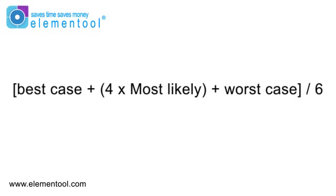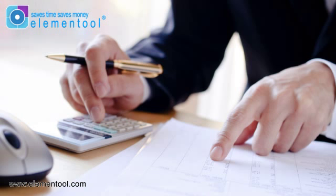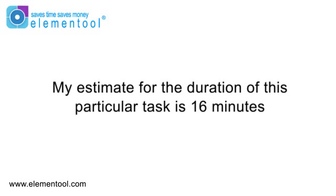Now I take the formula, which is best case plus 4 times most likely plus worst case, and divide by 6. I plug those numbers in: 8 plus 4 times 15 plus 28, divided by 6. Then I get at my calculator — or, if I'm feeling up to it, I just do the math in my head. My result is 16, and that's my estimate for the duration of this particular task.